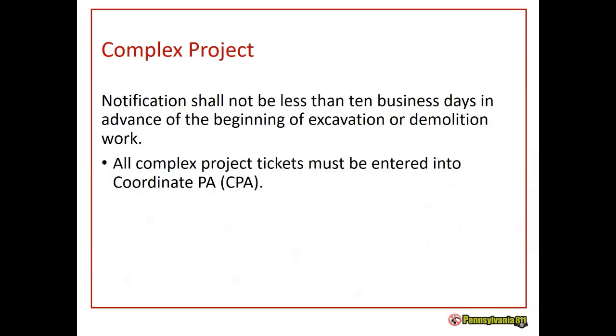It's the duration of the project. How long will it take you to complete? Will it require additional locates over an extended time frame? The impact of the job. Will it involve maybe closing a road, shutting off pedestrian traffic, or the possibility of service disruptions? So the impact of a project can vary from project to project. Also, the size of the project. How long is it? How long are you going to be there?